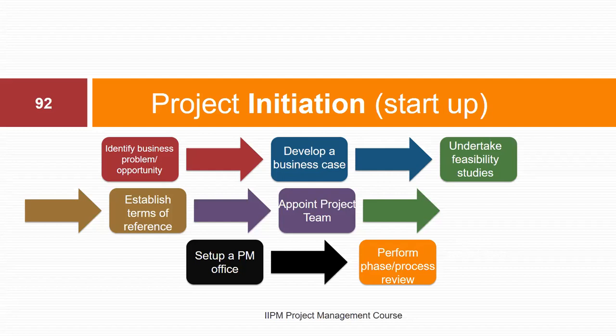And after you've conducted the feasibility study, if it's a good to go project, then you establish your terms of reference, the governance framework for the project. And then from there, you move on to appointing a project team, setting up your office, and then performing a phase review to know whether you're able to achieve the expected objectives for this particular phase or not.